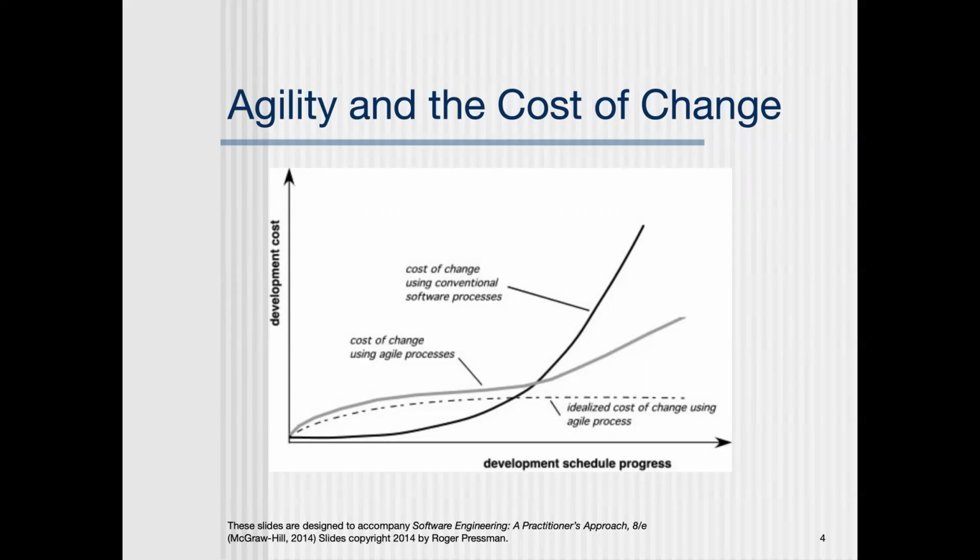But when the change comes later in the development process, then there's a nonlinear growth in the cost to that system. I'm not sure if I mentioned in this class or the other class, but I was once working on a pricing system for a health insurance company that I was working for. I'd never had any computer courses at all, so I had no idea of software engineering, but I was basically on my own and I gathered what I thought were the correct documentation, made it all the way through the process, talking to all the people involved, only to find out at the demo meeting for the bigger boss that I had not been aware of an entire line of business. It meant that my 6 months of work or whatever it was was useless. I had to start over again.